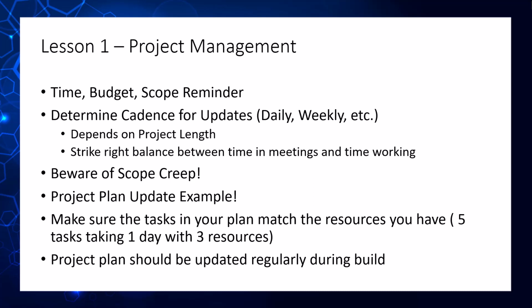If you have a 3-week project, getting updates once a week really isn't going to help you, because by the time you realize that your development's starting to slip, you're already a third or 2/3 of the way through the project, and there really isn't much that you can do at that point. Versus if you're getting daily updates and you realize after the 3rd day that things are starting to slip, you can try to tweak other things in order to complete the project on time.